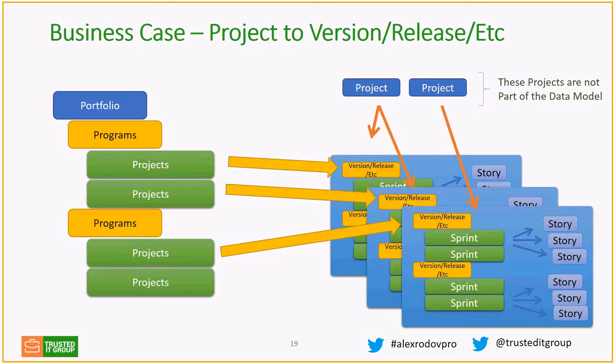So for each release, you would come up with the budget, you would come up with X amount of story points, X amount of backlog, and on average, you would say each story is 10 story points. Then you come up with the average number of story points per release, and you can come up with some budgets, some timelines, how many sprints it will take, and you can do some PPM classic planning for your continuous releases, and each release becomes a project.